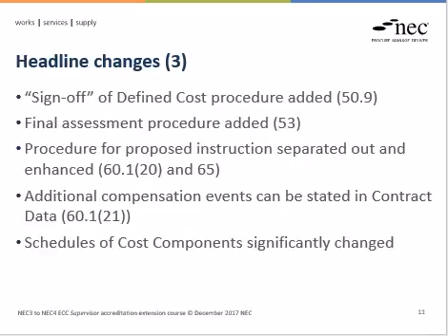Clause 50.9 brings in a new sign-off of defined cost, enabling the contractor to get defined cost agreed and signed off during the course of the contract. A final assessment procedure has been brought into the contract in clause 53.